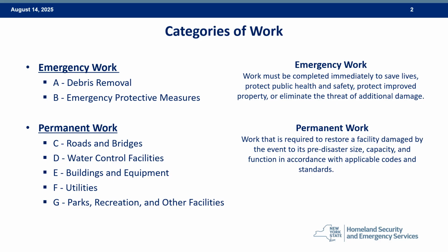Provide the dimensions of the damaged area along with any quantities you can identify. For example, if a road was washed out, you will need to provide the length, width, and depth of the washout, along with the volume of material needed to fill it in.